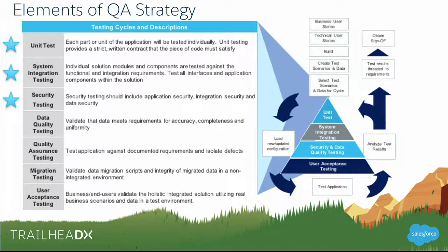I do want to make one note of data quality testing as well. That conceptually, right? I think a lot of organizations pile too much of their QA lifecycle within that full sandbox space, the single full sandbox space for enterprise edition customers, for example. If you're doing too much in there, if you're doing feature validation, QA activities, UAT activities, data integration testing activities, all in that same space, you're prone to a lot of false results from a testing standpoint, right?